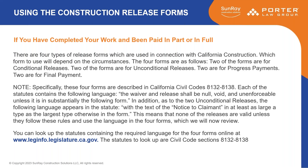I know that contractors try to add things into these releases, like things you may find in an indemnity clause, that don't belong in these releases. To the extent that occurs, it would make the release null, void and unenforceable. So keep your eye out for that. What you say to the contractor, owner, or sub — whoever gives one of these to you — is: the Civil Code says you can't change these things around. You have to use the language in the Civil Code, nothing more, nothing less.